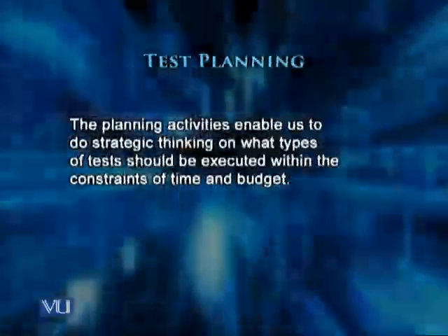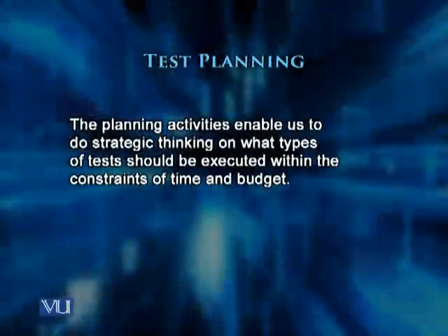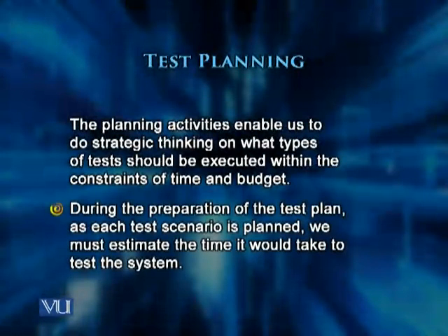And so test planners have to be creative about selecting those test cases which can provide maximum coverage in minimal time and within the budgetary resources. And so this itself is a very important and very creative activity. During the preparation of the test plan, as each test scenario is planned, we must estimate the time that it would take to perform that test.